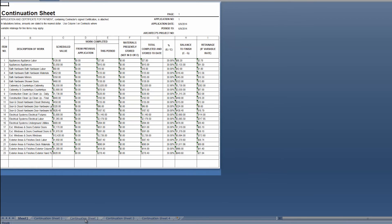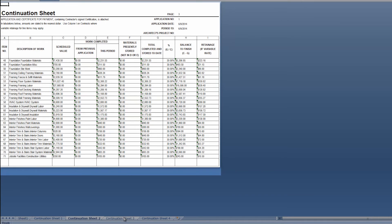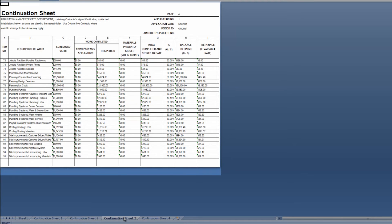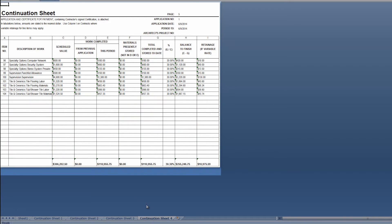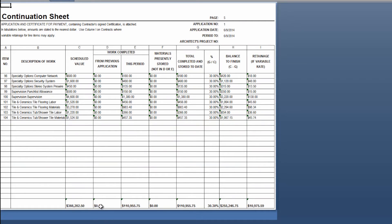As you step through these sheets you will see that you can continue through the estimate to see different items, and as you get to the bottom you will see the totals for the scheduled value, the work completed both this period and previously, total completed and stored to date, percent complete, balance to finish, and retainage.